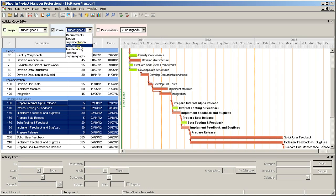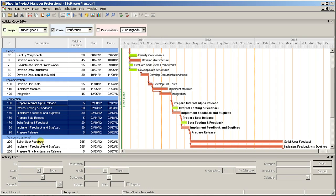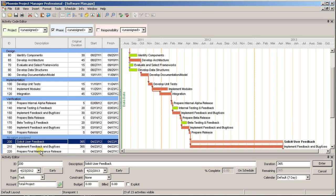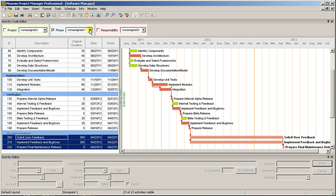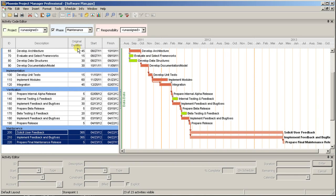With the Phase Coding complete, you can see the schedule is now broken into five sections, one for each value under the Phase Code.